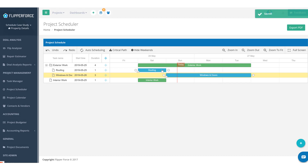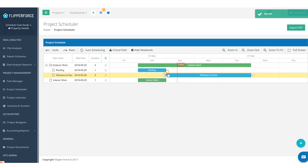Now we've got roofing and windows and doors in our schedule. What we need to do is connect these two items — this tells the scheduler that in order for windows and doors to start, roofing has to be completed first. So windows and doors can't start until we get the roof completed on the project.